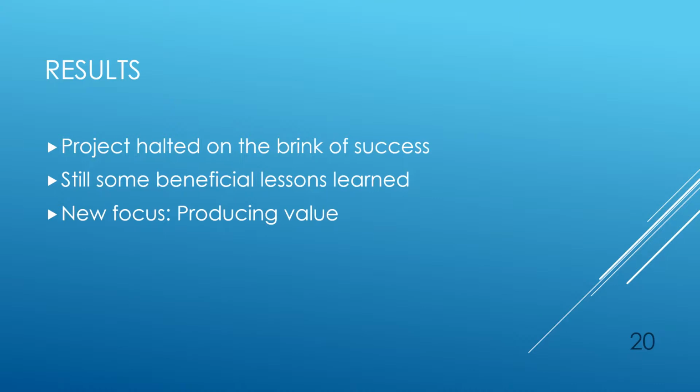Wanjia Anderson, I undertook an effort to find other solutions to CPOE systems that might be considered by the dentist. A scaled-down request for proposal, RFP, was considered, but with limited time there was a sizable risk that it wouldn't complete before the end of the semester. I run a lot of RFPs as part of my job and understand the process and risks very well, and it is very common for vendors to overpromise and underdeliver on an RFP timeline.